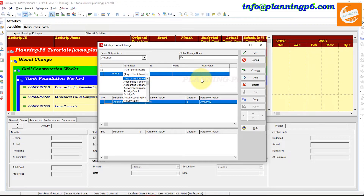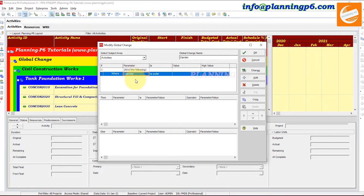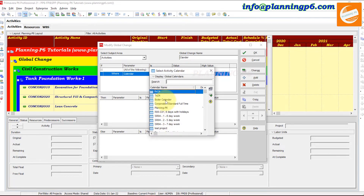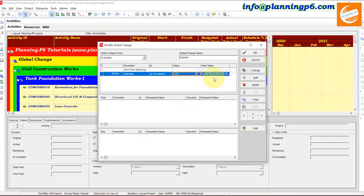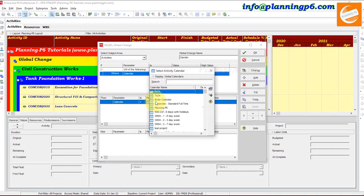Secondly, we can also change the calendar using Global Change. Prepare a new Global Change and click Add New. Under Activities, set the condition — Calendar equals a specific value, for example '7 by 24'. In the 'Then' section, set the new calendar value. Suppose we want to change it to '6 by 24' — enter that as the parameter value and click OK.